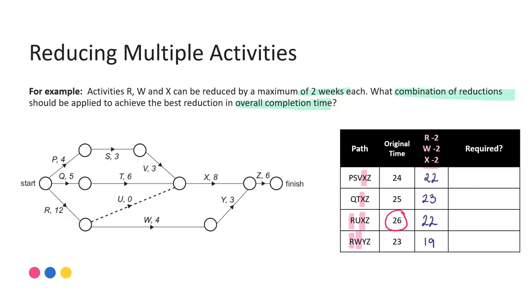Take everything that you were told you're allowed to do and reduce everything. And so when we've done that we can see our new critical path. Our new completion time is 23 and our new critical path is QTXZ with that X having been reduced.